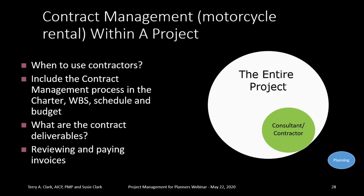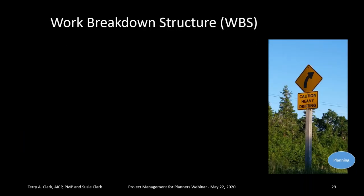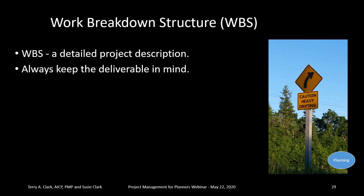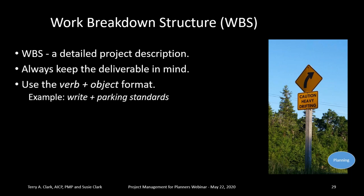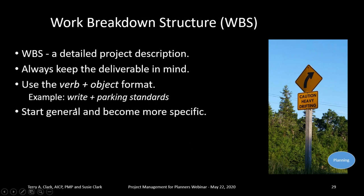Zipping into the work breakdown structure — this is the detailed work description. Always keep the deliverable in mind. Use a verb-object format — if you don't, you can't estimate duration, level of effort, and resources. For example: 'write project parking standards.' If you just had 'parking standards,' you wouldn't know what you're doing with them. Start general, become more specific, keep statements short and to the point, and apply consistent numbering.